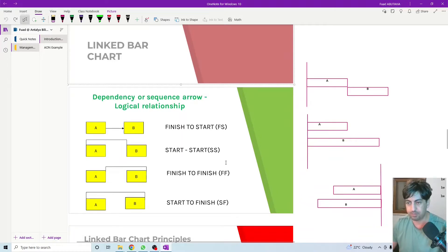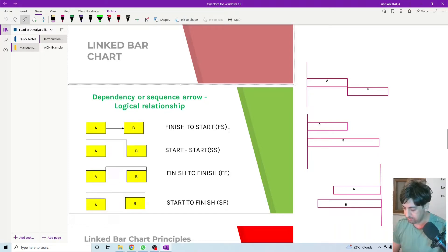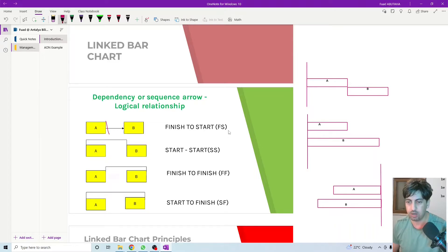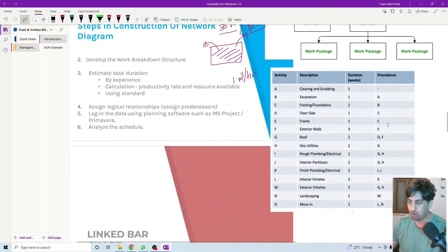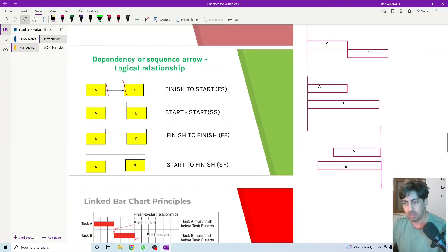So here we have activity A and activity B, linked with a finish-to-start relationship. It means that activity A must finish in order for activity B to start — finish-to-start. This is what we have for all these types of activities with the same finish-to-start relationship. Now, what other types of relationship do we have? We also have start-to-start.